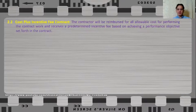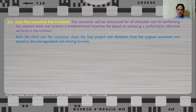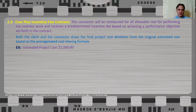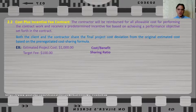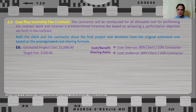In a cost plus incentive fee contract, the contractor will be reimbursed for all allowable costs for performing the contract work and receives a predetermined incentive fee based on achieving performance objectives set forth in the contract. Both the client and the contractor share the final project cost deviation from the original estimated cost based on a pre-negotiated cost sharing formula. For example, with an estimated project cost of $1,000 and a target fee of $100, the cost-benefit sharing ratio is: in the event of cost overrun, the client bears 90% and the contractor bears 10%; in the event of cost underrun, the client takes 80% of the benefit and 20% goes to the contractor.